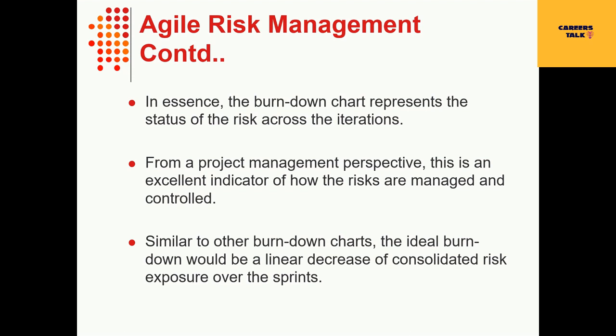From a project management perspective, this is an excellent indicator of how risks are managed and controlled. Similar to other burndown charts, the ideal risk burndown would be a linear decrease of consolidated risk exposure over the sprints.